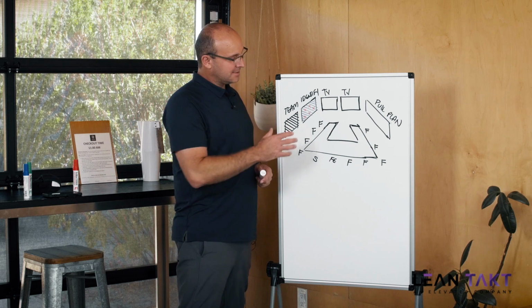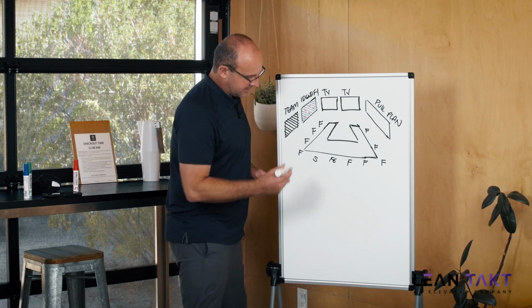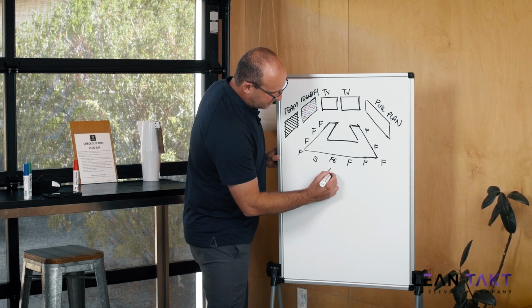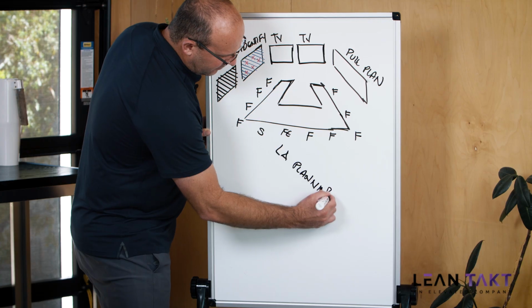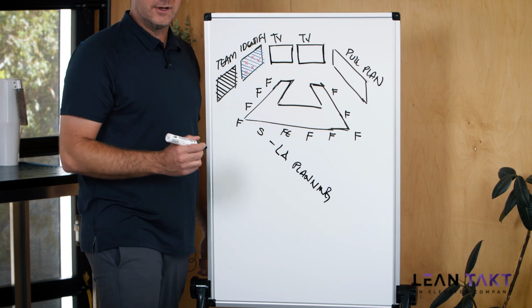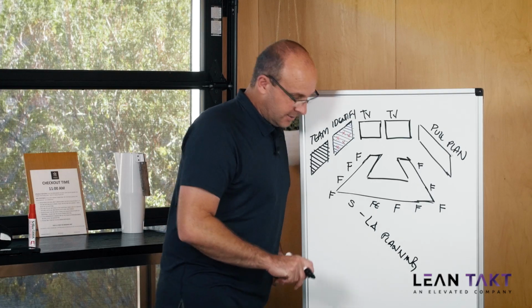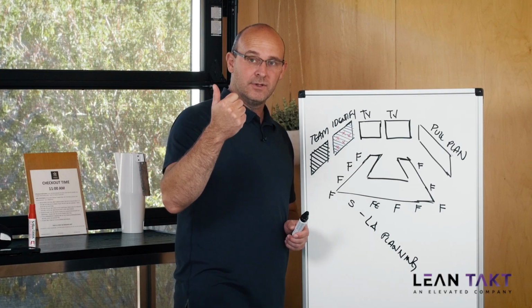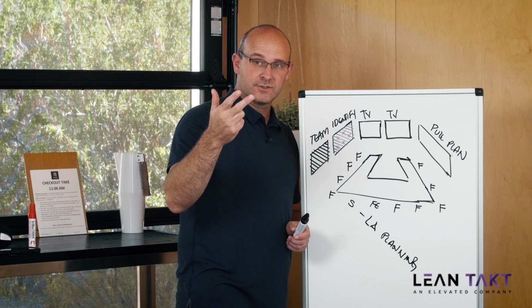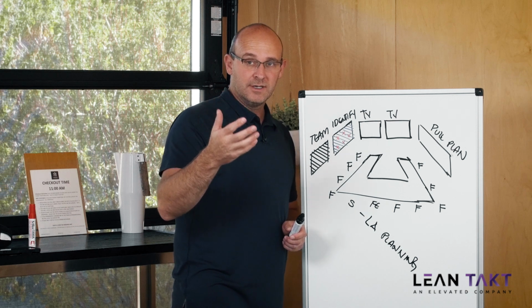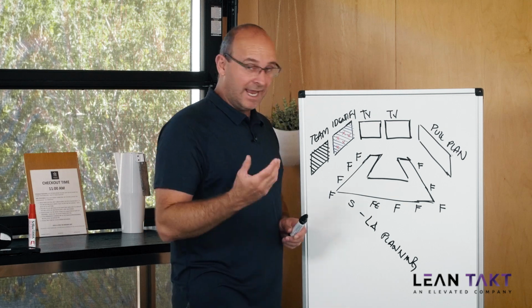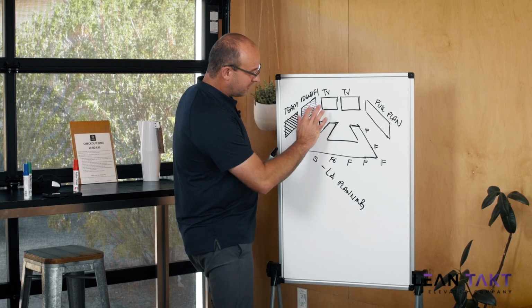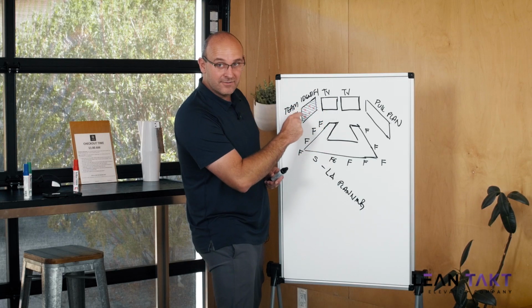So in this meeting, let me just talk to you about this. The purpose of this meeting is to do look ahead planning, which, if you remember from the other videos, is all about making work ready. Do I have the people, the plan, the resources, the tools, the equipment, the materials, the permissions, the layout, everything that I need to go do the work? And if you don't, identifying roadblocks, right here, identify board.